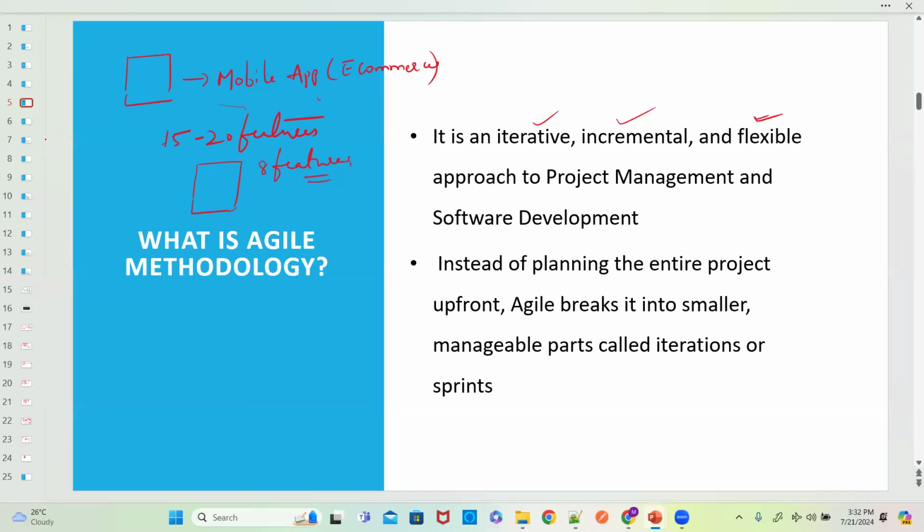But here in Agile methodology, it says be flexible. For example, in the first release, we wanted 8 features and we decided what all the features required. But in the last maybe 15-20 days, if they have the authority to remove one feature and add another new feature, and there is a possibility of delivering it, obviously we can do that. That way, it should be flexible.